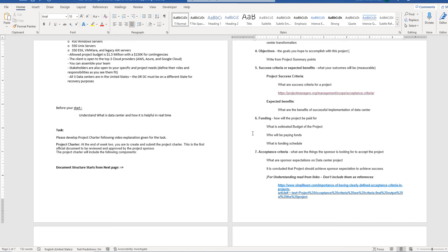Maybe for this project a one-time allocation of funds can be made. That is one type. If you are writing that, ignore the second type. The second type is milestone based, where they might allocate the funds. If the first milestone is done, then funds for the second milestone might be released. In that way the funds will be released. Okay, so this is basic information related to funding.